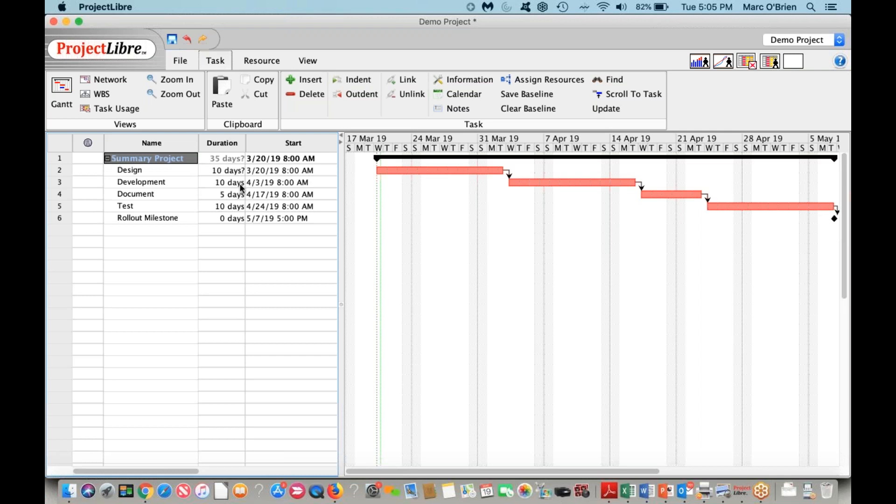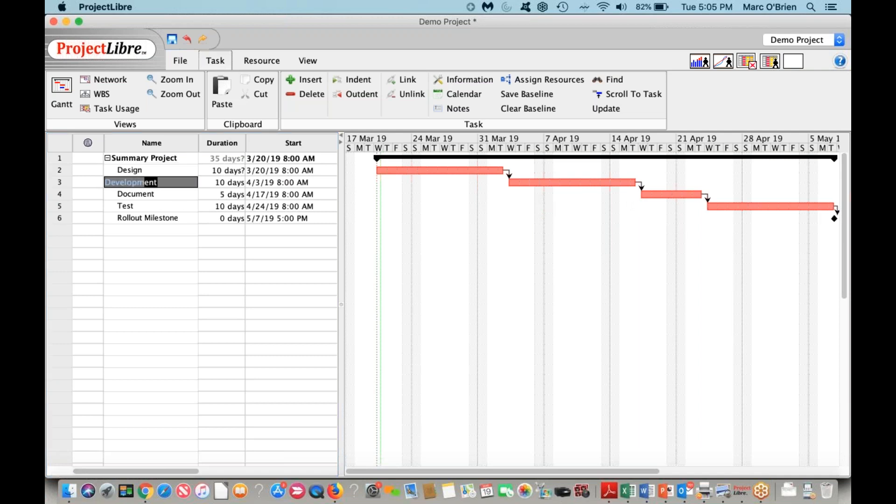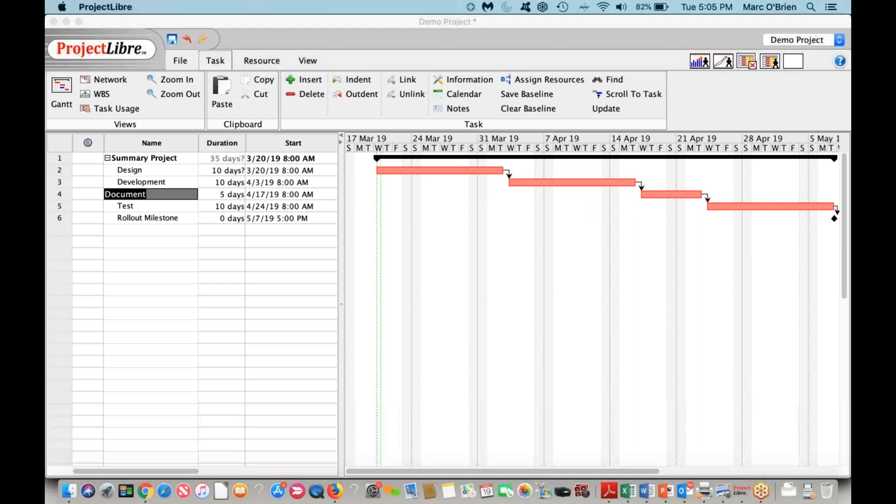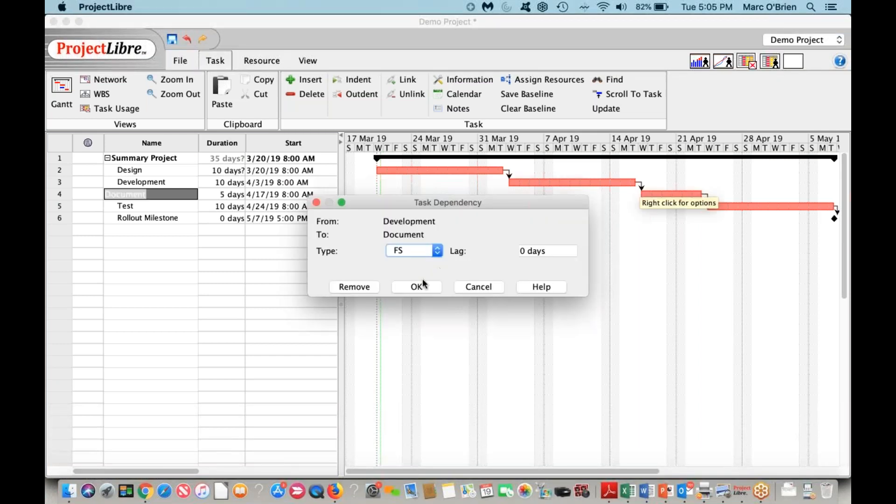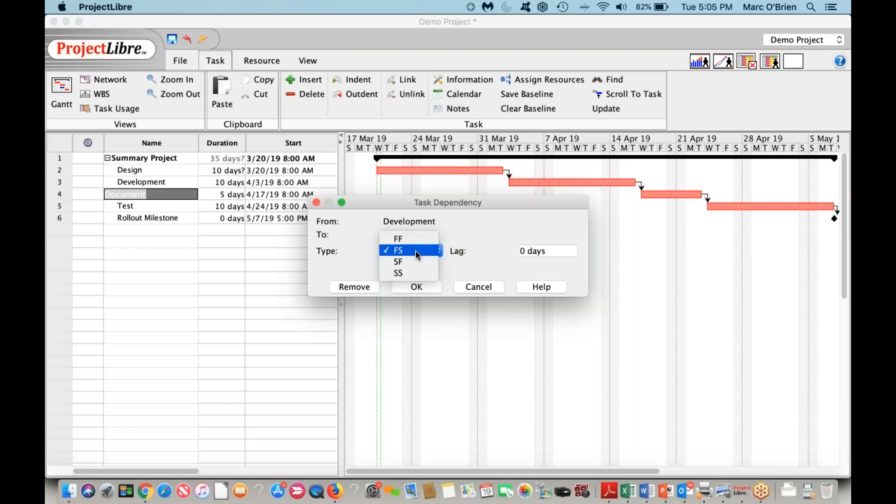That was auto-linking with the predecessor relationship. However, if I think development and documentation can occur simultaneously, let me edit that. When I click on the link, you can see the different link types. I can have tasks finish at the same time with finish-to-finish, do serial with finish-to-start, do start-to-finish, or start-to-start where they start simultaneously.